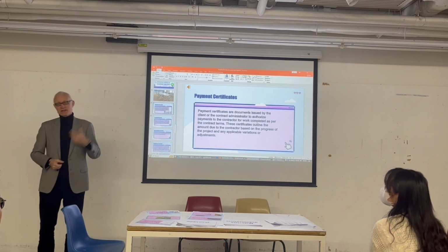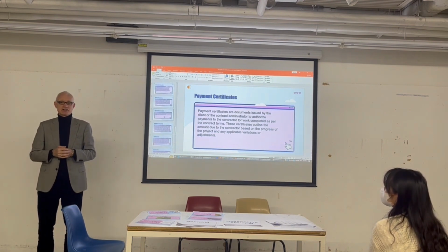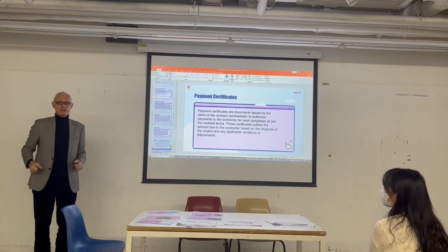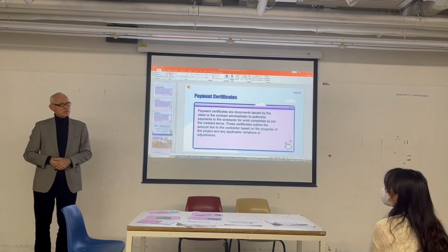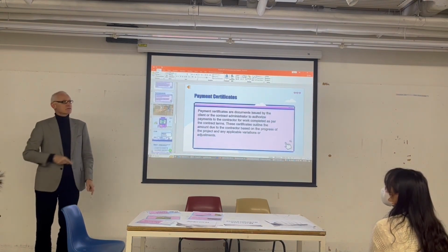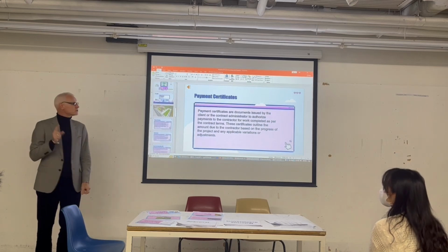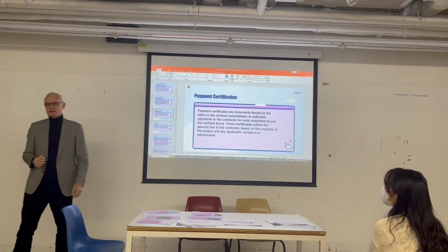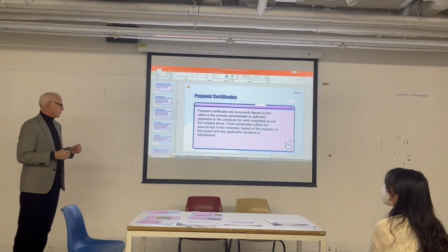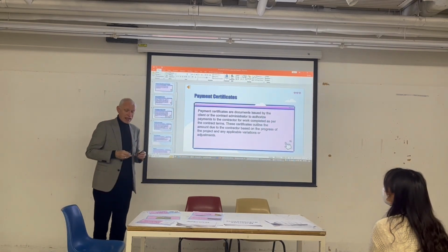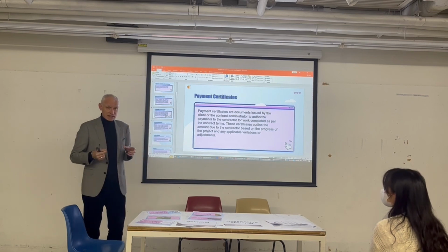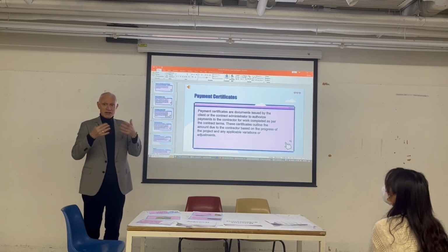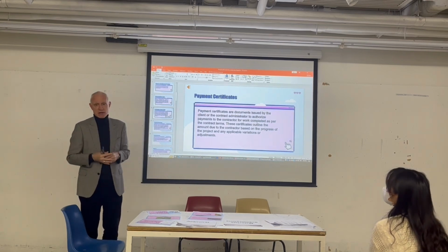We'll say, okay, there was a typhoon, you can't work, have an extra day to finish. The other is, he's in the coffee shop when he should be working, then you need to take money off him. Sue him for delay of delivery. So we call that liquidated damages. Liquidated means to turn it into money, the damage into money.